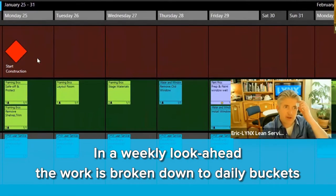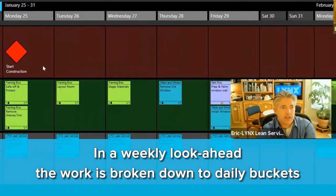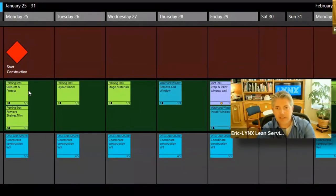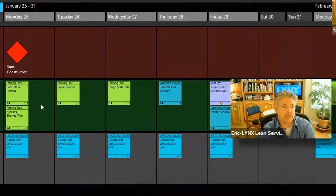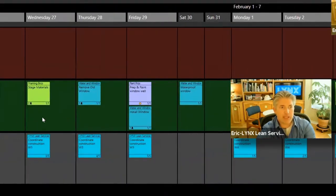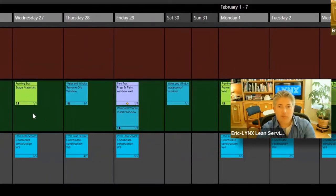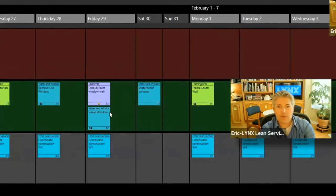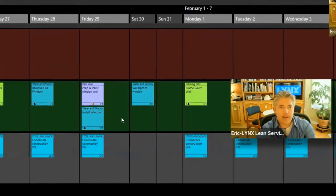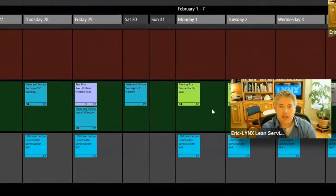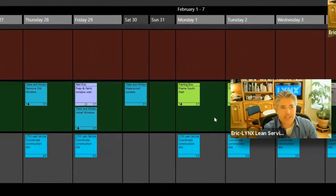Next Monday is our official start date in construction. We are going to safe off the space and protect any finishes, and we're going to start with some demo and then pulling out some of the shelves. We're going to do some room layout and we're going to try to get that window swapped out in time to get ready for framing out the first walls the following week.